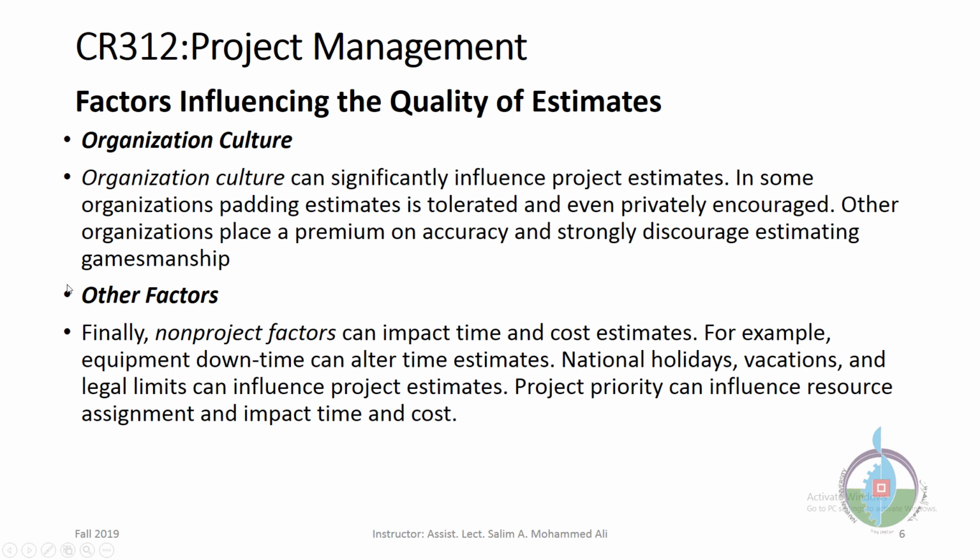There are several factors that may affect the quality of estimates, which are non-project factors that can impact the time and cost of the same. For example, equipment downtime. Some of the tools you are using have failed to work again, so you have to order another one, and it will make time and cost more. This will significantly alter the time of the estimates.